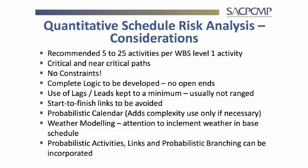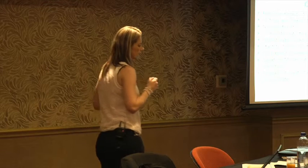For probabilistic calendars: forget about the calendar in the schedule. If you link a risk, link it to what you assessed in the risk workshop — the likelihood and the possible weekly impact. For weather modelling, don't double-dip. If a contractor has the right to claim one and a half days of inclement weather per month contractually, take that into account so your risk assessment doesn't double-count it.